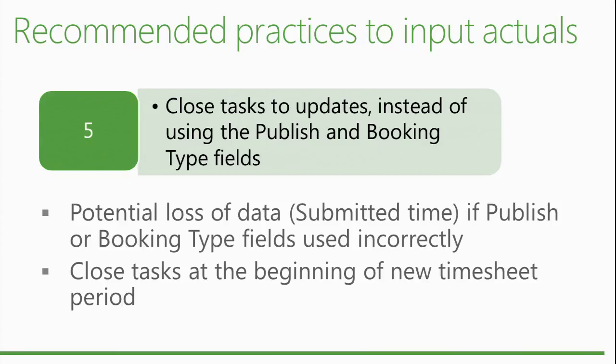If it's complete and the time that was planned for it has been achieved, you could still enter time for it if you don't close it out. It would still show up on your timesheet, right? But if you're not allocated for it, then it won't show up. What you're saying is that by closing it out, it'll prevent further time. Yes, it will prevent any updates to that task.